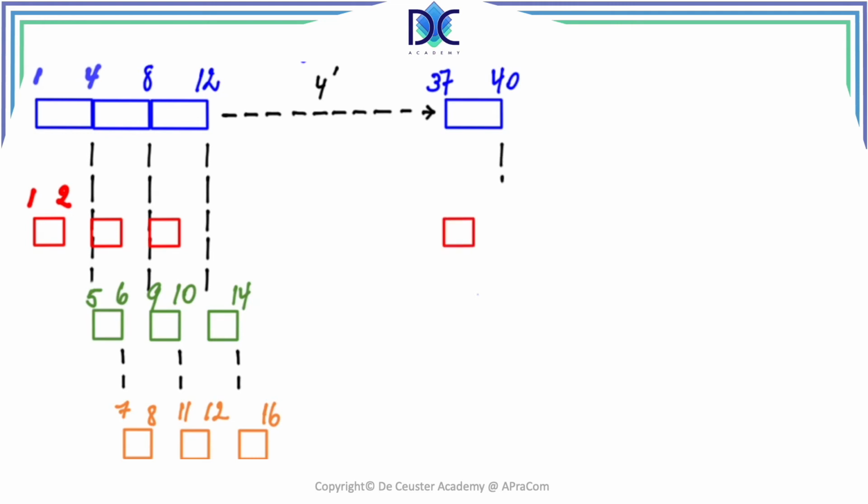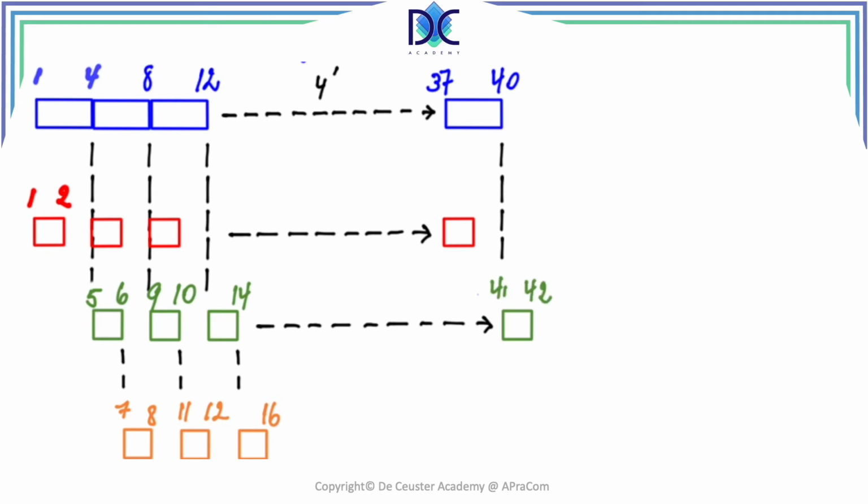We can also add there the numbers for the other activities. So we have the wheels added to the frame, and we see that we can add the wheels to the frame starting on minute 41, finishing on minute 42. We then do the testing. The testing of the last bicycle can be done between minute 43 and minute 44. And here our project is basically finished.